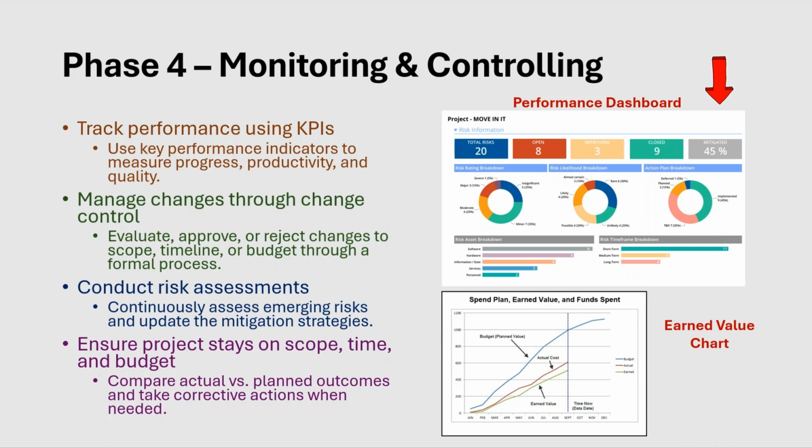To support this phase, we use tools like the Performance Dashboard, which provides a real-time overview of risk status, open issues, and progress breakdowns. Another powerful tool is the Earned Value Chart, which compares planned value, earned value, and actual cost, helping us analyze performance and forecast outcomes accurately.